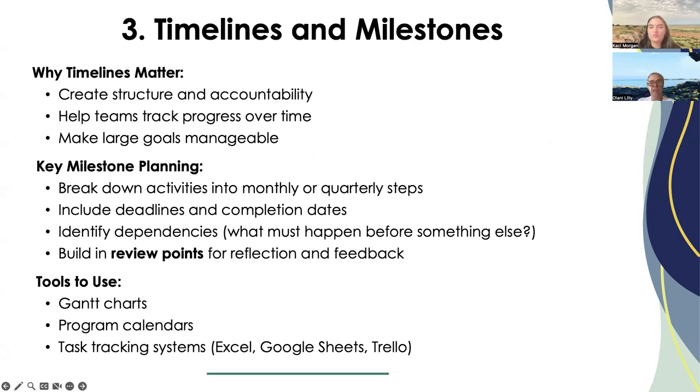When developing your timeline, you want to check for any bottlenecks. Like, do several major tasks all rely on the same person or the same resource? Can you spread it out a little, even if it's spreading out the time in which that work can be accomplished? Also, timelines should include community events or seasonal considerations, like gatherings or activities that happen within particular seasons.